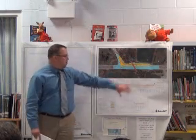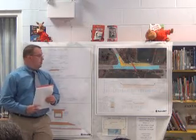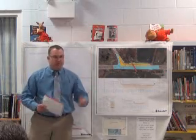The other two alternatives we investigated were precast box culverts. One was a four-sided box that we put in, also submerged 2 feet below stream bed. And the other one was a three-sided box built on concrete footings. Both have their advantages, both have their disadvantages. One disadvantage of the three-sided box is the time to pour the footings, because that has to be cast in place on site. Whereas a four-sided box is precast, gets delivered to the site and installed. Disadvantage of the four-sided box is we've got shallow bedrock there. That bedrock's going to have to be excavated to get the thing set down to grade.